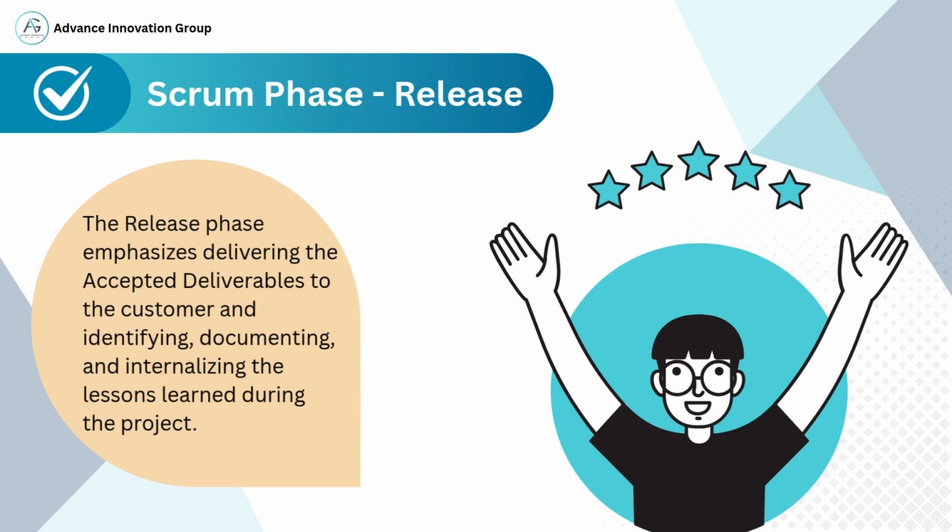Inputs include: 1. Scrum Core Team, responsible for presenting completed work. 2. Sprint deliverables, the product increment developed in the sprint. 3. Sprint backlog, the tasks selected for completion during the sprint. 4. Done criteria, defines when work is considered complete. 5. User story acceptance criteria, specific conditions each user story must meet.